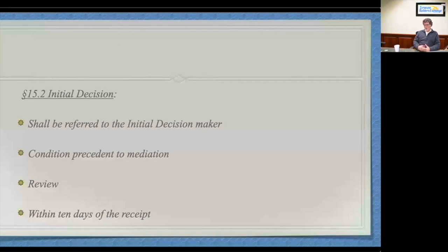In that scenario, if in your subcontract you've got 21 days for notice of claim and the GC's got 7, and you get your notice in on 14 days, it's not your fault in that instance, Mr. and Ms. Sub, if that claim fails as a plans and specs-based claim, you should still get paid. Or if the GC puts it in the inbox and forgets about it for a couple of months, as long as you've complied with your notice of claim.